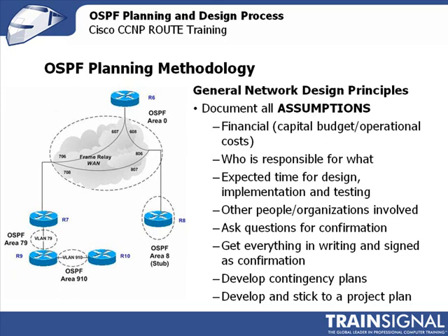Document all your assumptions: financial, who's responsible, expected timeline for design, implementation, and testing, other people or organizations. Always, always ask questions for confirmation and then get it in writing. Make sure that that's confirmed or signed in some way, because especially if there's a change in leadership, you need to be able to actually back up what it is that you assumed and showed and demonstrated are the requirements. Develop contingency plans and also develop and stick to a project plan.